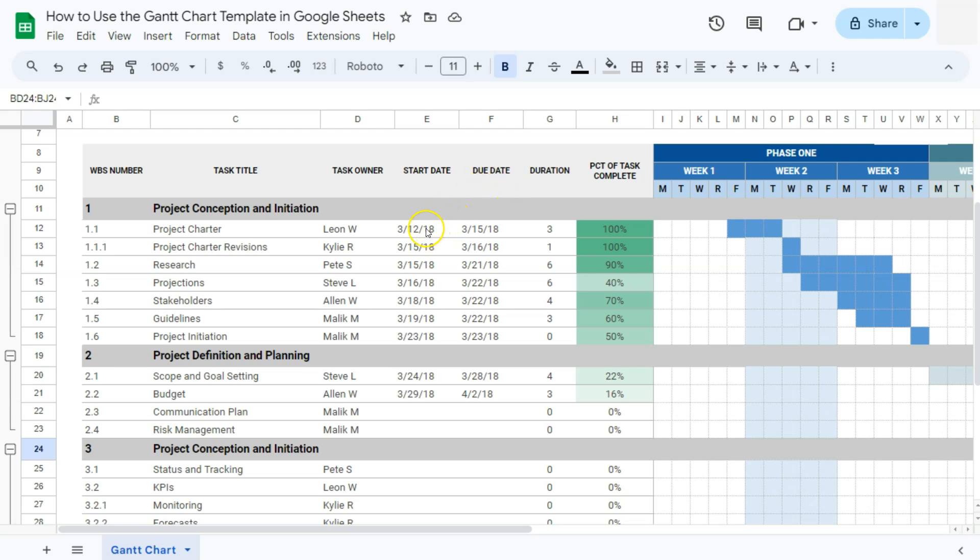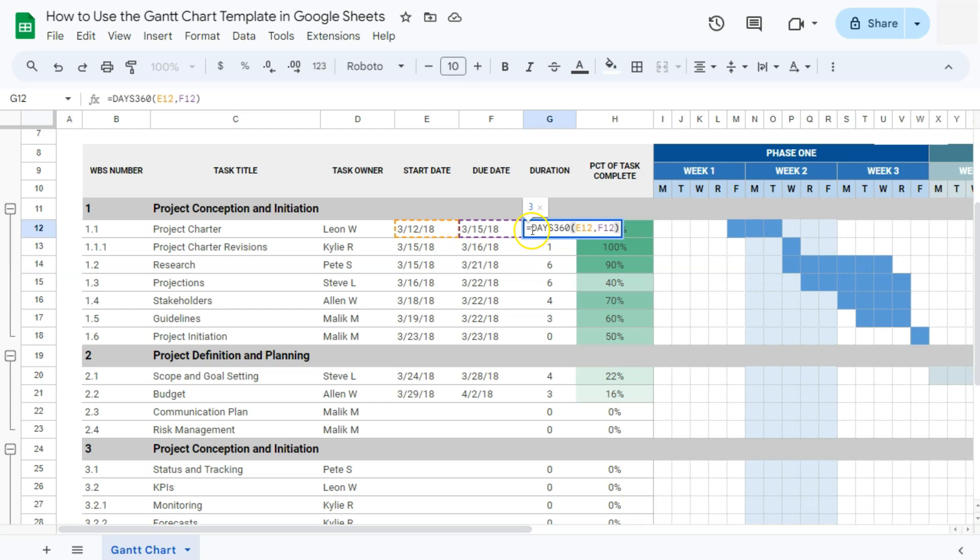Based on the start date and the due date, the duration of the task can be calculated. If I click on this one right here, you'll see that we have a formula days 360 with the cell reference of our start date and our due date, which gives it the duration of three days.